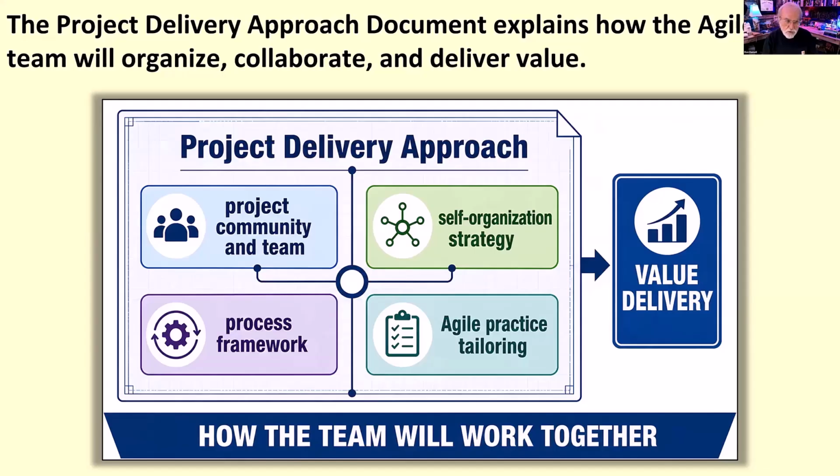So what we're doing here is we're saying, okay, we're going to use the Scrum methodology, or we're going to use Kanban. If we saw from the project vision statement in the product box that this is highly volatile requirements, we may want to do something that gives us the ability to prioritize every day, like Kanban. With Scrum, we can do every 2 weeks or 3 weeks, whatever increment works. Or we could take some tailoring and bring in some of the parts of other methods, like DSDM and Crystal Clear and all those other frameworks. We could bring in and tailor it.